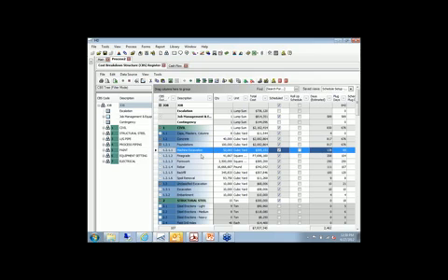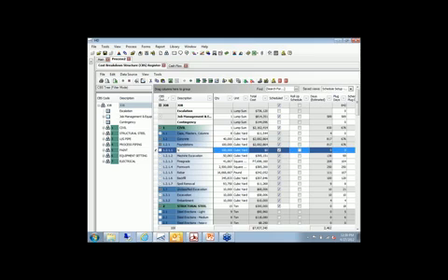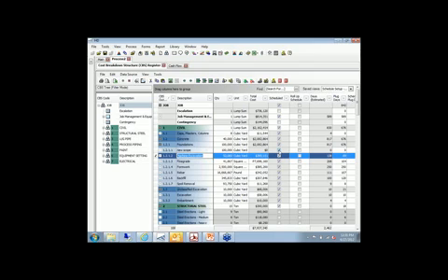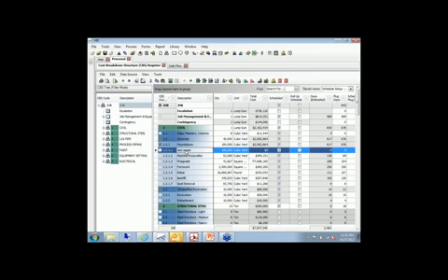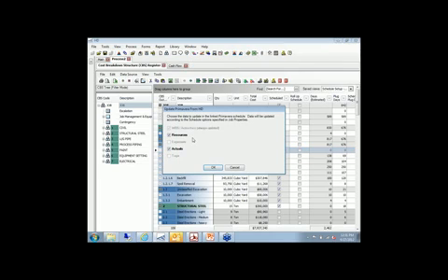Okay, so again, I don't have to remember to go into Primavera to make those changes. When I'm ready, I can simply go up here and say, okay, let's go ahead and update the Primavera schedule from hard dollar. You know what, before I do that, let's just add a new item in here. Maybe we'll add some new scope in here. We'll just call it new scope. Okay, and you can see it inherited its properties. It's going to be in the schedule. There'll be a bar for it. So when I update Primavera, you're going to see that new item in the WBS because of the rules we've defined. So let's go ahead and update Primavera.